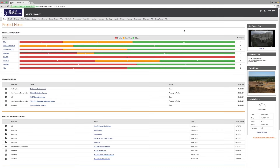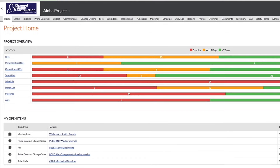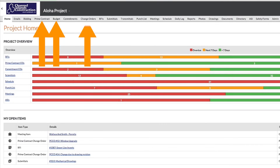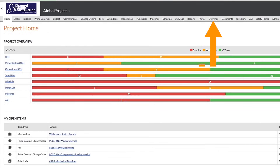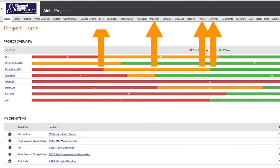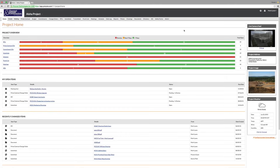The project level features manage the data for each individual job in its own secure space. For example, every project managed in Procore will have an area to manage the financials of the job like the budget, the contracts, and the change orders. Every project will also have areas to manage drawings, photos, meeting minutes, RFIs, and so on. Data is not mingled between projects.